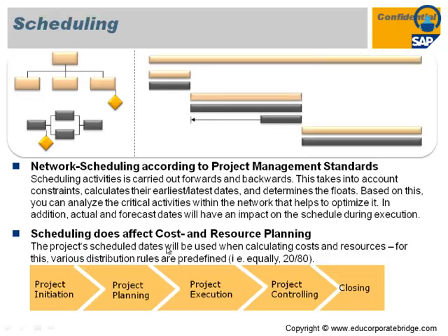It will define your time span for those activities, and it will be rolled up from the lower level WBS to the higher level WBS, and from the lower level activity to the higher level WBS assigned to it through the network.